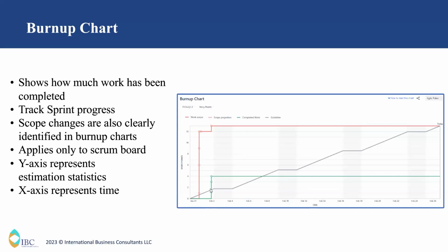So like this, it shows the minute things the team does. So the team actually progresses. And always in a burn up chart, if the team is doing work, it should be in increasing order. But you see here, it's flat. So the team doesn't make any progress and they are not completing the estimated issues in the time they planned.